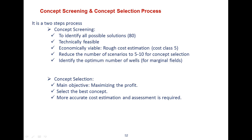The main objective of concept screening is to identify all possible solutions — potentially 80 to 150 scenarios — then perform technical feasibility to select technically viable solutions, and make an economic evaluation with rough Class 5 cost estimation, reducing scenarios to 5 to 10 for concept selection. Sometimes the number of production wells is also an optimization parameter. In concept selection, the main objective is maximizing profit (net present value) and reducing net present investment, requiring more accurate cost estimation and assessment methodology.